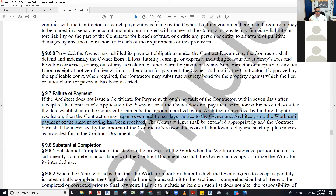The work can only be stopped by the owner, or by the authority having jurisdiction — for example, the governor could stop work, the building inspector could issue a stop order. The owner can direct a stop to the work. The architect cannot direct a stop to the work. The contractor cannot stop the work — except only if they have not been paid.